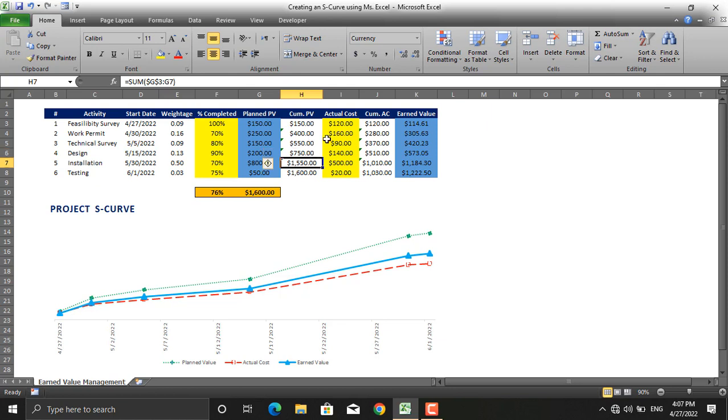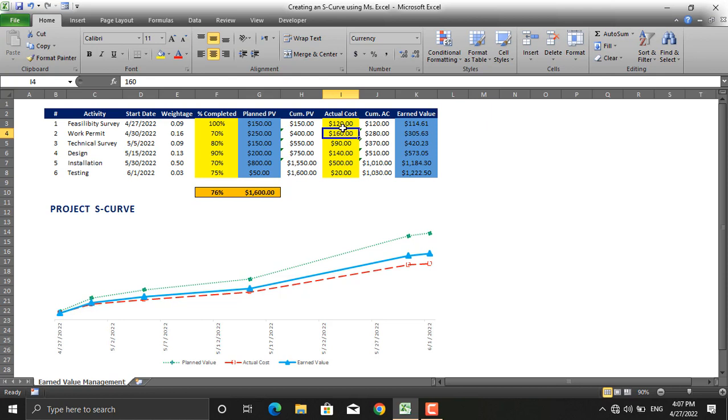Next column is the actual cost. Actual costs are the costs that are actually incurred by the project, which you will have in your daily reports maybe, or maybe in your procurement trackers, or whatever financial records that you have for your project. So you insert them in here. There is no formula for them.